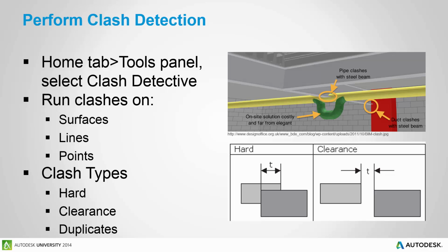Basically, the Clash Detective identifies, inspects, and reports interference clashes in a 3D project model. Clash Detective can automate the manual task of checking for clash errors, and you can use it for a quick check of design work that an engineer has just completed, or for ongoing audit checks of the project throughout the project process. This can be done easily by a project coordinator.